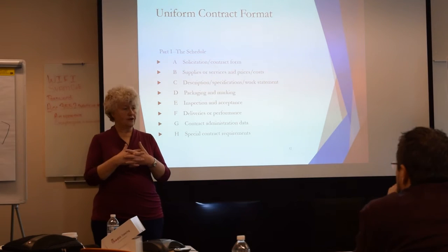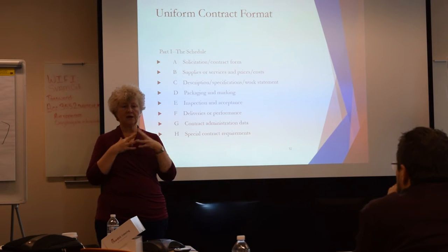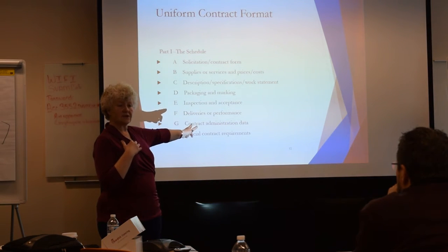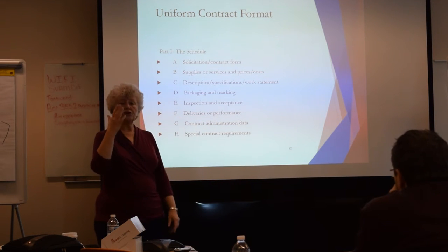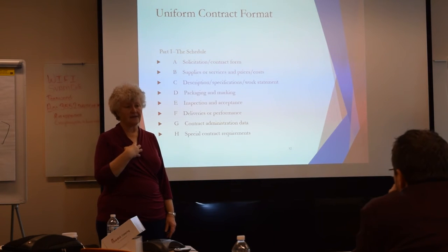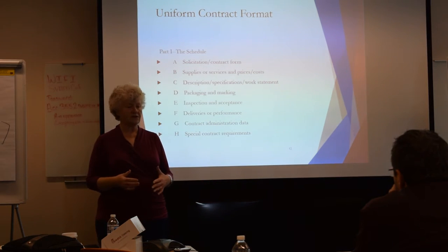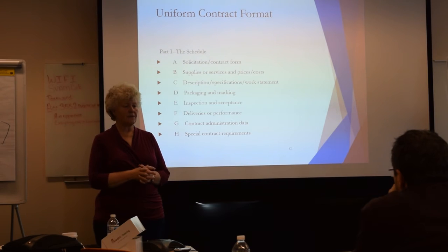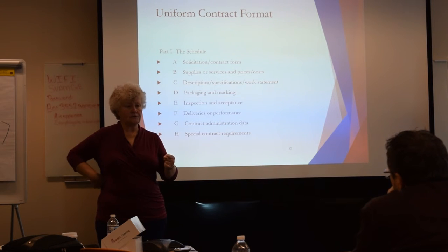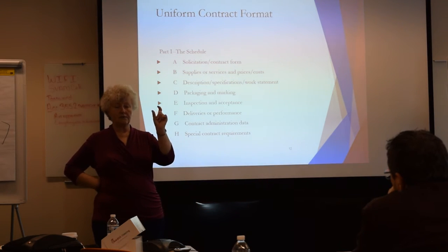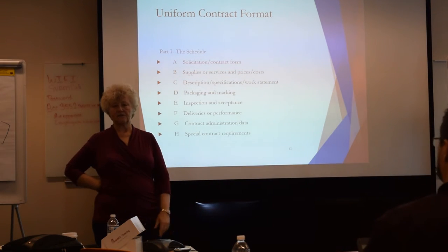When the contract gets awarded, if I'm the government, I can't order anything from you unless it's on this contract baseline, this menu, schedule, this section B. You, the contractor, can't sell me anything unless it's on Schedule B. So let's say, for example, you're going to sell this computer system and you start to put it all together and the government's like, well, wait a minute, where's the power cord? Oh, I didn't price any power cord. They can't buy a power cord from you unless you add a power cord through a contract modification to that baseline, and then once it's added, then they can order it from you.